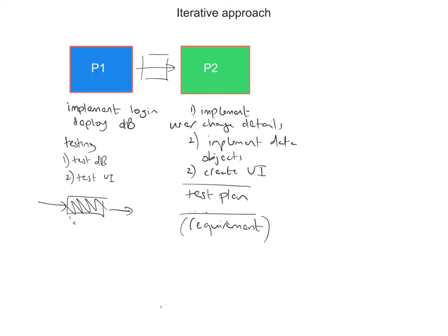So what we're going to do with this requirement is we're going to do the analysis and some design as well, just as we described before. This becomes an addition to our functional specification, which was our design document that we were trying to produce, which is great because until your project ends, you should always see requirements specification and design specification or functional specification as live documents. With the small caveat that these are only short projects, so you can't.